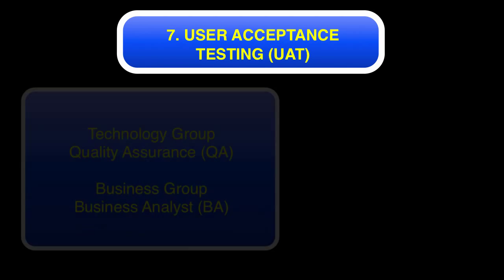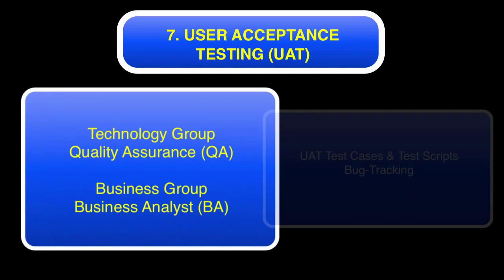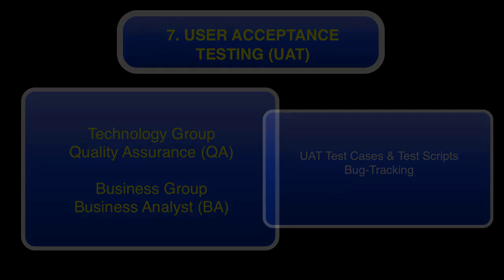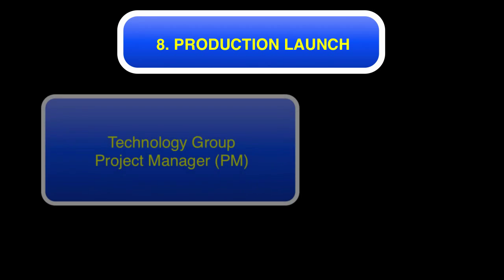That leads us into user acceptance testing. We move from the technology group back to the business group. The QA team has to sign off on unit and integration testing before UAT begins. The business analyst has to create a full user acceptance test plan mirroring all their business requirements. They have to include all the test cases and test scripts and use the bug tracking database to enter any issues with business or user acceptance testing.